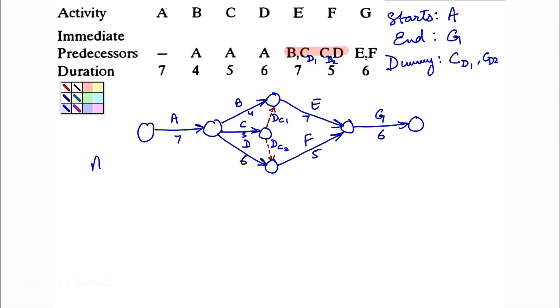We have a path A, B, E, G. The duration for this path: 7, 4 — giving 11, and 7 — giving 18, and 6 — giving 24.